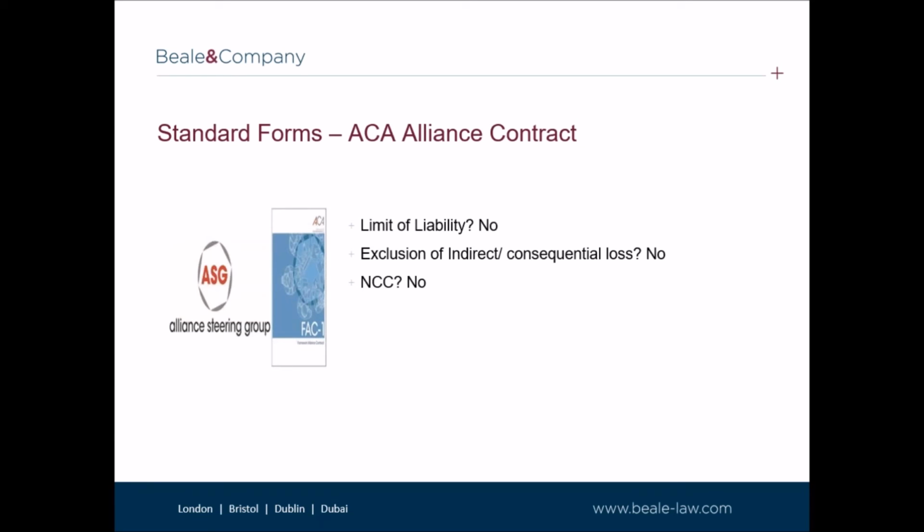And finally, and very briefly on the standard forms, the ACA-ACE Project Alliance Contract 2015, or PPC 2015. The collaborative forms are intended to be suitable for projects of any size, designed to support BIM and used under any legal system. Surprisingly, the PPC 2015 does not contain the common limitations and exclusions which we have just discussed and would therefore require a number of special terms to supplement the agreement. This includes, importantly, drafting of a cap on liability. In light of the unlimited liability position and lack of exclusion clauses, the current form may not be attractive to consultants.